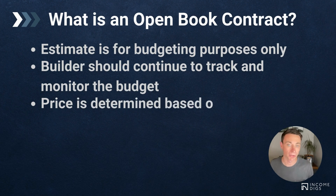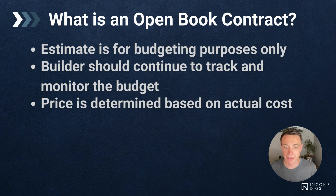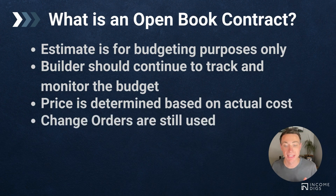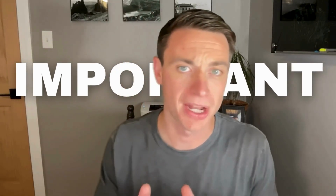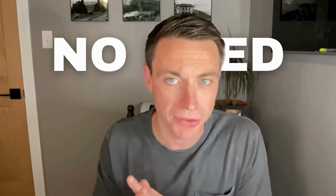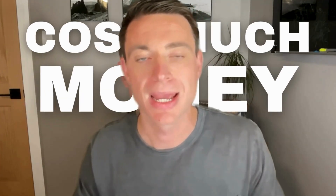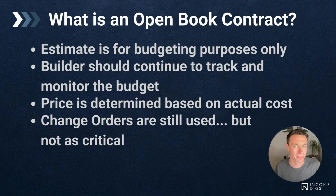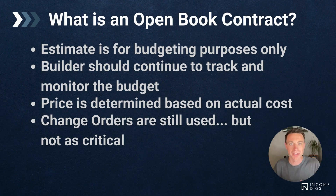Your price is determined by the actual costs you incur, and the builder should continue to track and monitor the budget throughout. Change orders can and should still be used, though they're not as critical. A lot of people think with an open book contract there's no need for change orders, but it's important to use them specifically when scope is changing — it helps with documentation, showing that everyone agreed to extra work and the associated cost. If you don't have those change orders in place, it's a harder conversation when unexpected costs arise.